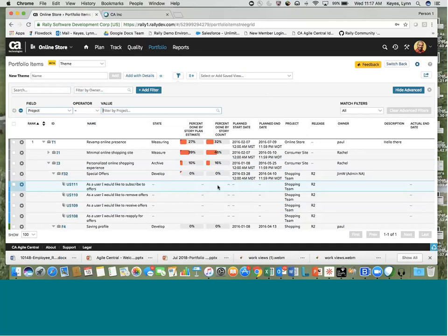I had folks that were having problems with their features, but when I looked to see how they had them sized, they had different people throughout the organization adding the features, and they were sizing them very differently. So you want to have that sizing convention set up within your company so everybody understands a feature fits into this box. It's a quarter, or if it's variable, you can make it a little bit different, but as long as everyone's doing the same timeline. This particular customer had a feature that would be completed in 1 day, a month, 6 months, and then a year. So it was very inconsistent, and it was causing a lot of problems with their reporting. So make sure that you are checking on that and that it's consistent throughout the organization.